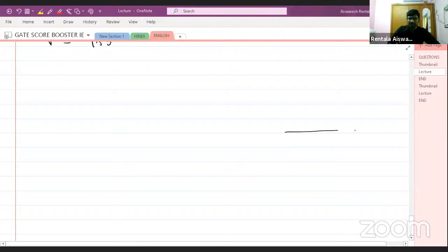Activity completion times will follow beta distribution, and the entire project completion time will follow normal distribution. So this will be the value of mu, which is 14 days given, right? But you have to calculate, let us say, x is equal to 17, right?